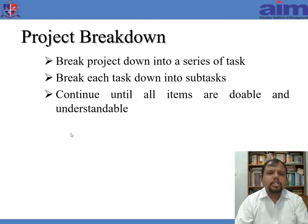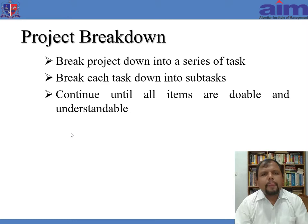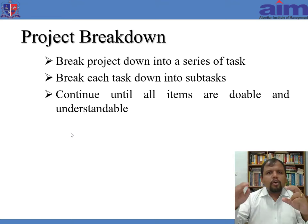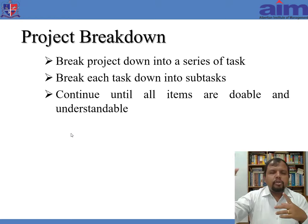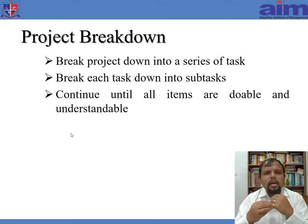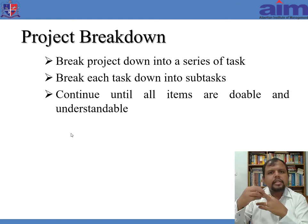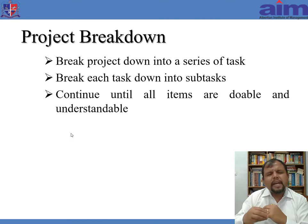Now let's look into the third step: project breakdown. Break the project into tasks, break each task into sub-tasks, and continue until all items are doable and understandable. For example, construction of a house is a project. We divide it into various tasks: the first is piling for the basement, the second is constructing the structure, the third is plumbing, the fourth is putting in windows and doors, the fifth is electrical work, the sixth is interior designing, the seventh is putting tiles, and the eighth is painting.